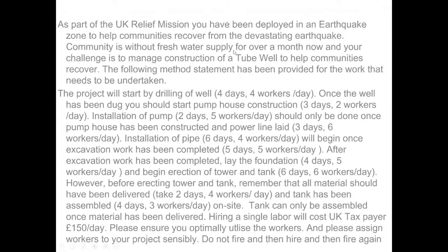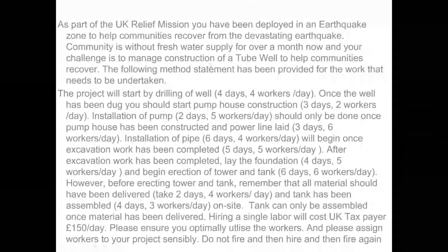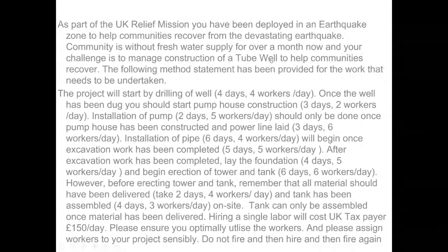The community is without fresh water supply for over a month now, and your challenge is to manage construction of a tube well and a pump house to help the communities recover. The following method statement has been provided for the work that is to be undertaken. The project will start by drilling of the well. Once the well has been dug, you should start pump house construction, and then installation of the pump should only be done once the pump house has been constructed.